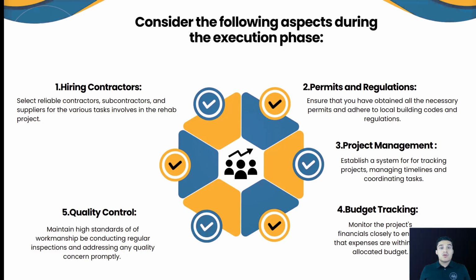I'm going to come in. You're going to tell me prior what things need to be completed within what time frame, and I'm going to go and make sure that you have completed that. Make sure that you have done everything that you were supposed to do because you told me it was going to take this long. So this is a good way of keeping them accountable, and also if they're not completing what they told you they were going to do, you can actually hold the check. Oh, you know what? You haven't completed this for me, and you told me you were going to do it. You were the one who told me it was going to take this long. You haven't done it. I'm going to have to hold this check until you actually do it. If you finish it by Tuesday, don't worry, I'll be here on Tuesday and I'll give you the check.